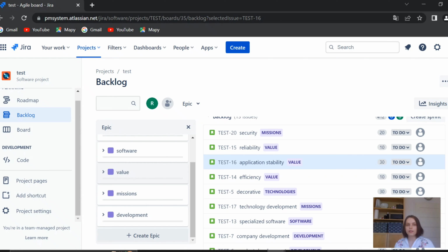Also, this task maybe does not need to be in your plan, like it's so easy. Or from 1 to 3, small tasks, from 5 to 13 tasks of medium complexity, and from 20 to 40 it's major tasks, and 100 it's a global task.